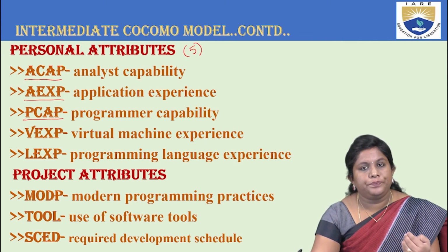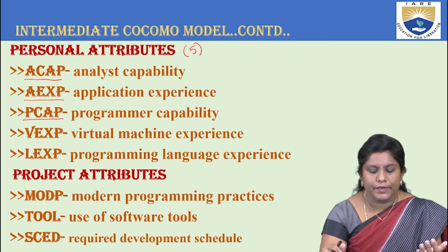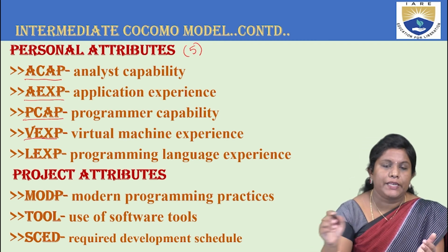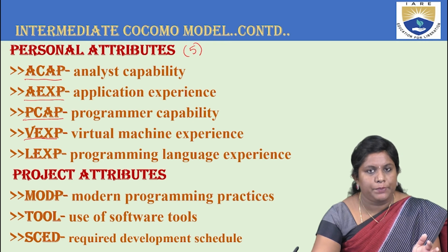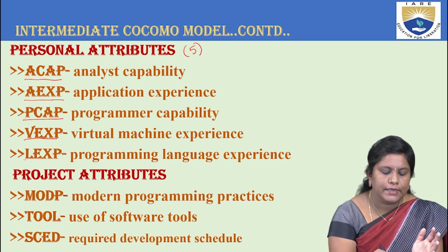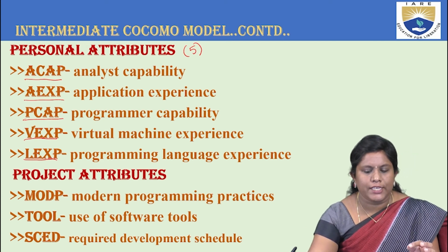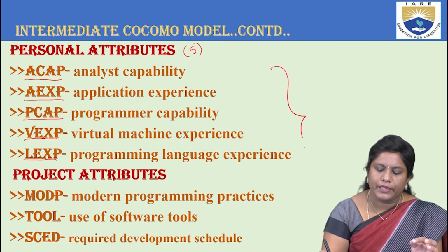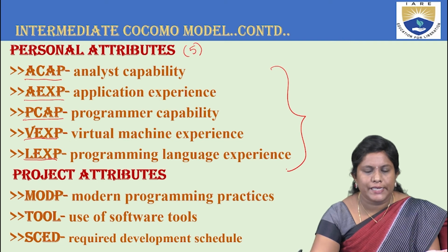And then virtual machine expertise. How independent or dependent it is. That is VEXP, that is nothing but the virtual machine experience. And then you have programming language experience, that is language experience, LEXP. So these 5 things come under the personal attributes as stated before.